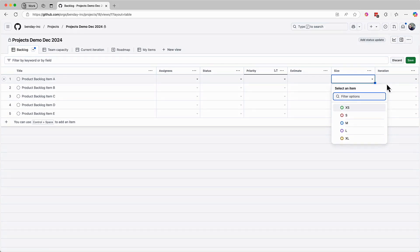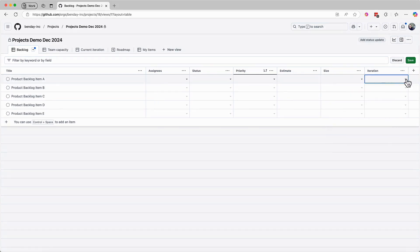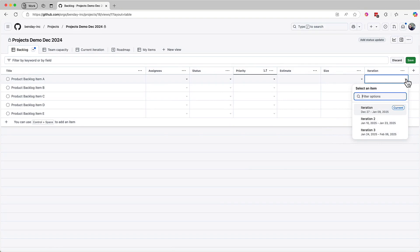And then the last column is iteration. Iteration is a scheduling value. The intent is to say when a PBI is getting worked on. In scrum, this means which sprint the work is scheduled for. I'd typically only set this value when I know for a fact that the work is getting done. Usually that'd be in the sprint planning meeting. I'll cover the sprint planning meeting in the next video.